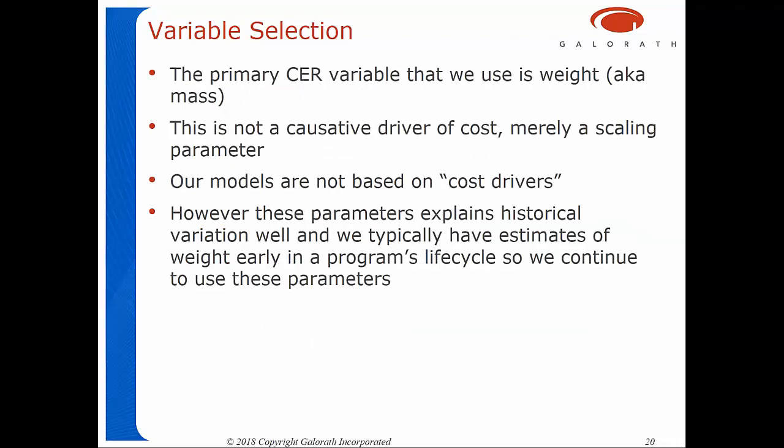And in terms of selecting variables, like I said, the primary CER variable is weight. It's not really a causative driver. We don't really have a cost driver model per se. It's merely things that are associated and correlated with costs and things that are available early in a program's lifecycle that we can use to estimate costs.